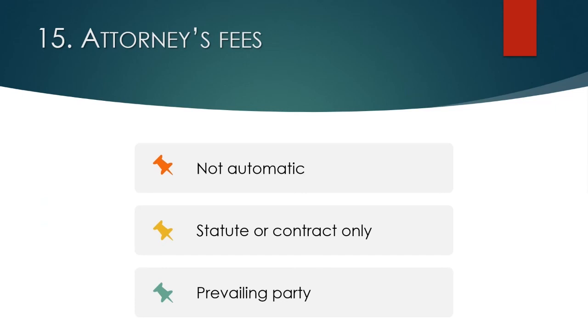The contractual provision relating to attorney's fees needs to be very specific so that not only do you get your attorney's fees if you prevail in the case, but you also get your attorney's fees for arguing about, after you've won the case, how much you are owed in those attorney's fees. If you don't have that language in your contract, there's an argument that you don't get attorney's fees for fighting about attorney's fees, which seems strange to most people that you talk to about that issue.